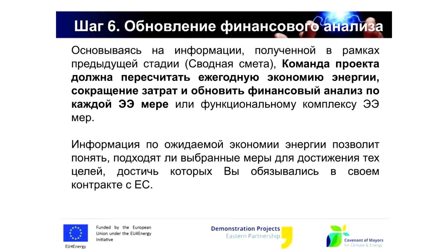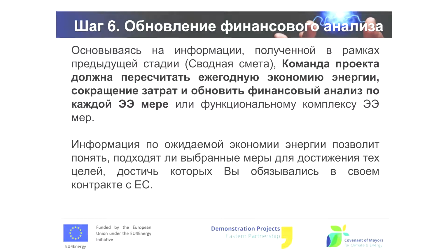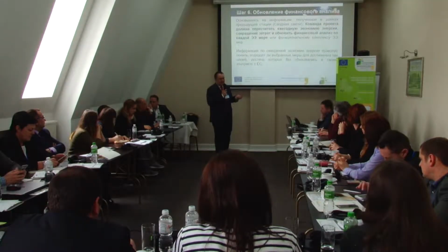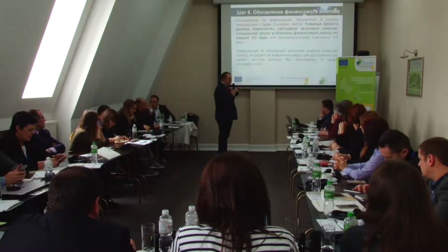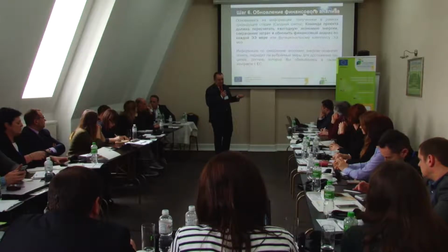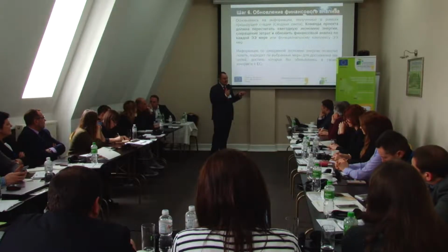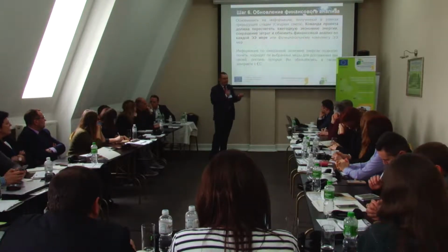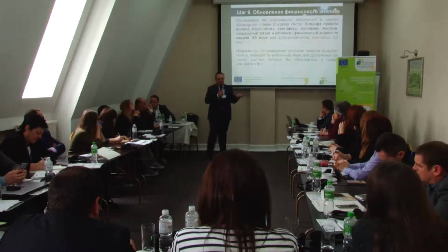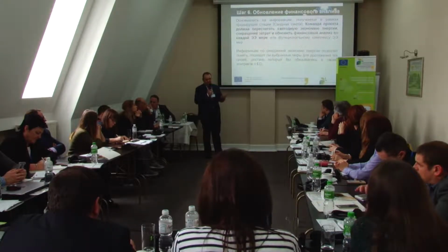Also, at the same stage, you need to update the financial analysis of the whole project. And again, from our experience, I may tell you that if there was an audit of insulation for a school, it had one cost, and after all the activities were taken into account, after the technical design documents were developed, this amount was increased by 30%, which is quite an amount, and which means that all the energy efficiency indicators at the stage of the energy audit were kind of leveled.